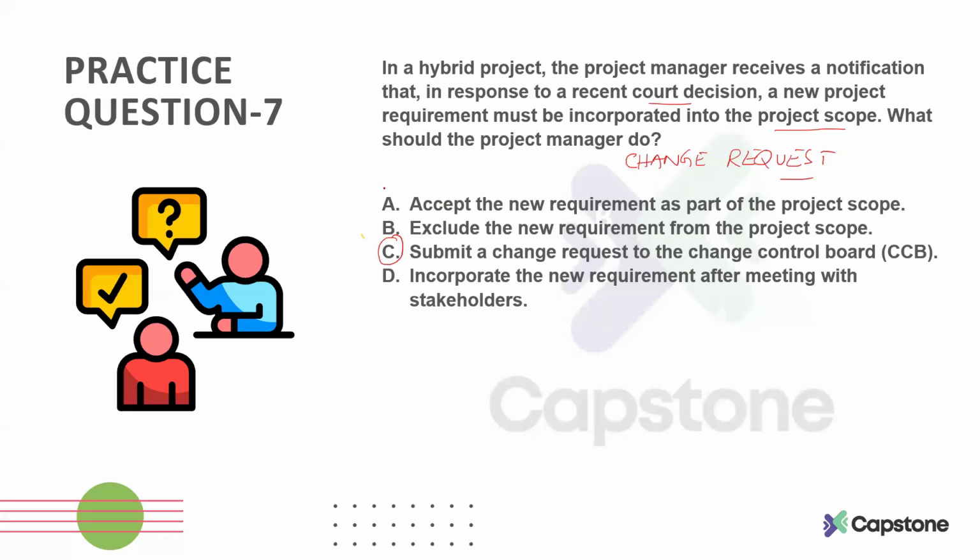You are not supposed to accept it immediately. Without any impact analysis or going to your change control board, you also cannot exclude it. Incorporating and accepting are more or less the same thing, so you cannot incorporate it unless you have approval from your change control board.